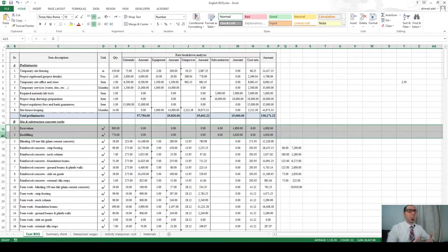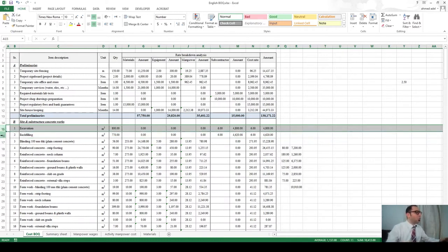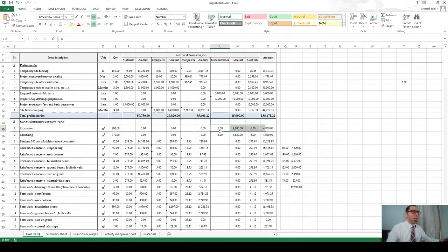And this is simply a list of assumptions that you have made in order to derive your estimate. So my assumption here is that I am going to do the excavation and backfilling by a subcontractor. I'll just go hire one guy who has some trucks, who has some excavators, and I'll give him a rate per cubic meter of excavation and backfilling. And this price should be obtained from the market via vendor or subcontractor quotation.